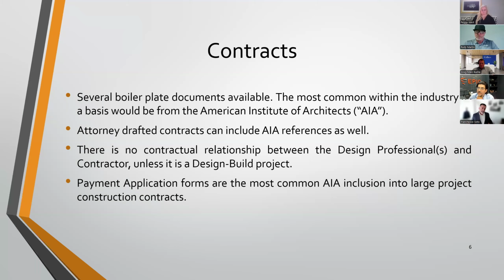And having all of that discussed, the AIA is a good starting point. But there are certain provisions in the AIA which you need to elaborate upon, and some that you may want to take out. Another issue that oftentimes comes up is how you want to deal with eventual litigation if you have to litigate. Do you want to go to arbitration? Do you want to have a mediation before you can litigate? Do you want to bypass in the 558? There are all different types of variables that you can negotiate. And oftentimes when you're negotiating that, it also impacts what type of leverage you can have with your contractor.